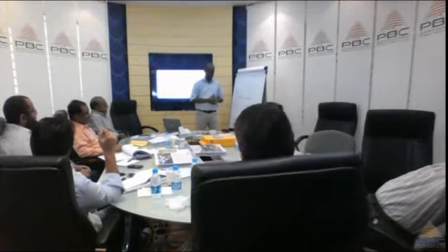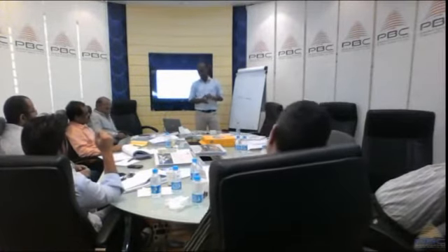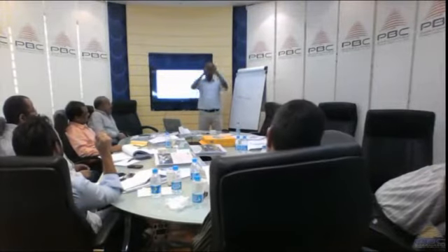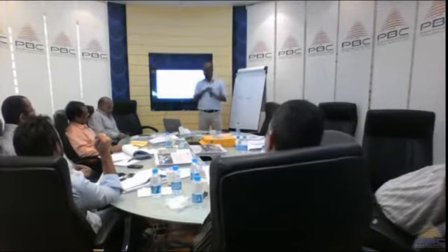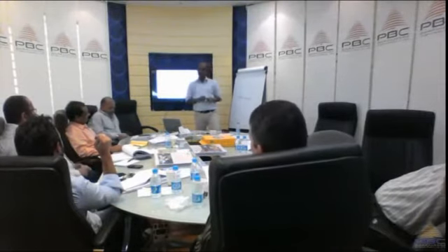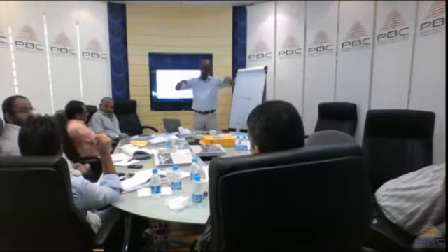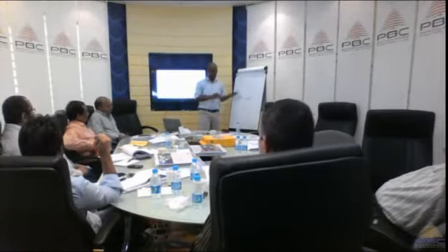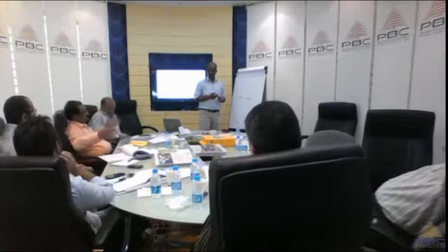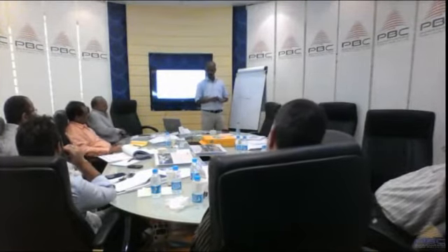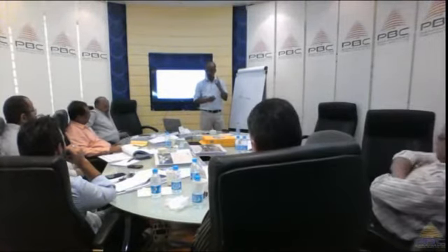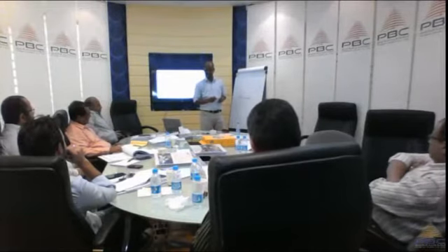So roughly how much does it cost to build a floor, if you combine all the costs? 3,000 riyal per square meter. And the floor is how big? 800 square meters. So roughly 2.4 million for one floor. And how many floors are you building? 25.